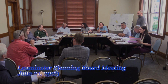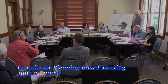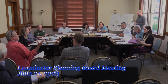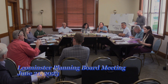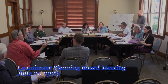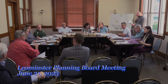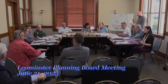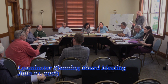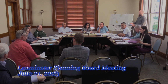That's the first thing. The second thing is that we've been going back and forth for years on this idea. The unit counts are dictated by zoning. It's different zoning, and they apply to the Brooks Pond development. There is no unit count requirement on this system. That's part of our zoning. And so what we've done is we subtracted some land and we subtracted units, and the remainder is left in compliance. That's what the building inspector reviews. That's what the engineering reviews. It's on the plan. So you can make it conditional on the unit counts being compliant with the zoning.